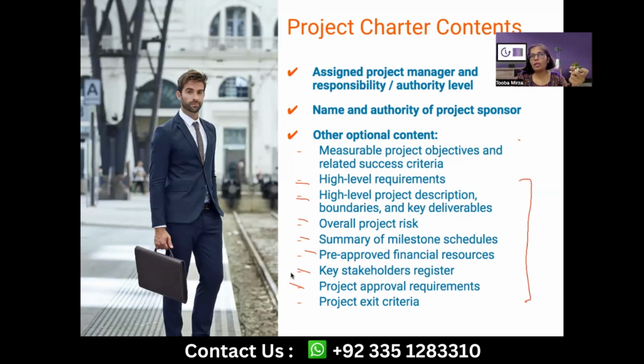And for agile, the sprint level conversation or the release level conversation, till the time you have not really gone into that, you need to have a reference point based on which the project is going to be referred, and the project is going to be evaluated at times, right? Point being, the project charter and these high level details should be input to the detailed level planning.